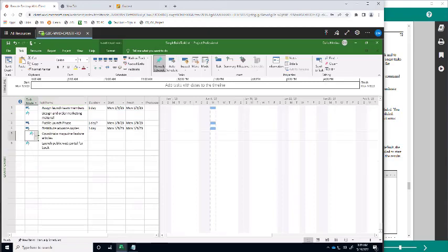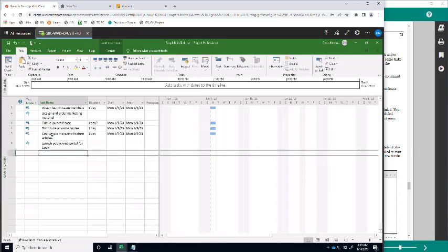Once you click on this specific cell, you see this drop down list, and then you click in here, and by default there are only two options. Either you do manual schedule, which is the default, or you can auto schedule it. In this case, it's asking us to select auto schedule, and I'll do that. Same effect, right? You see, I was able to select 3.